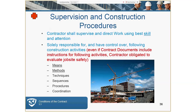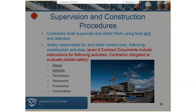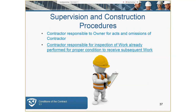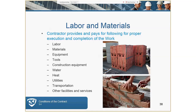The contractor shall supervise and direct the work using the best skill and attention, and is responsible for maintaining job site safety. The contractor is responsible to the owner for acts and omissions of the contractor and for inspection of work already performed or in proper condition to receive subsequent work. The contractor is required to pay for the cost of performing the work including all listed elements. Note that water, heat, and utilities are generally temporary during the course of the work; once the owner accepts the building, these may become the owner's responsibility.